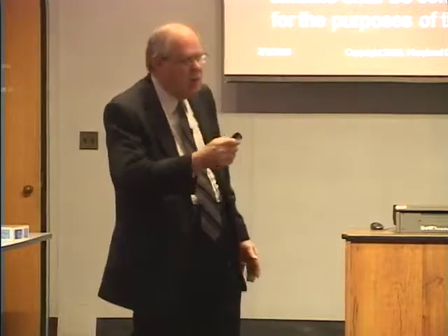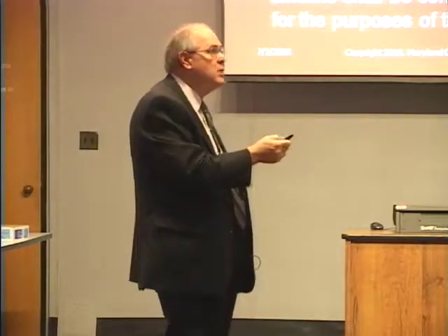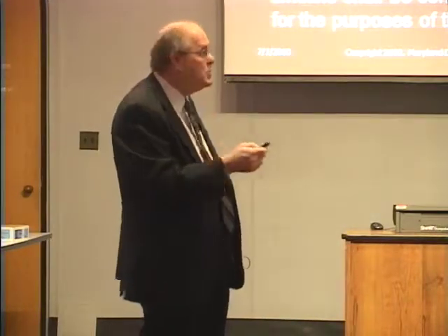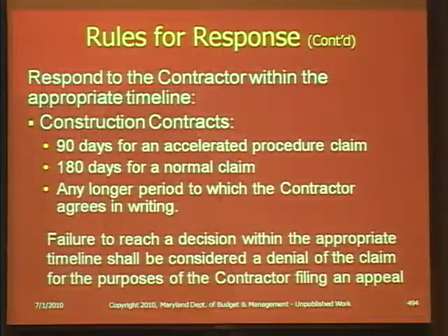But anyway, if it is an accelerated procedure claim, you as the procurement officer must respond within 90 days if it is a construction contract. If it is not under an accelerated procedure claim, you, the procurement officer, must respond within 180 days.